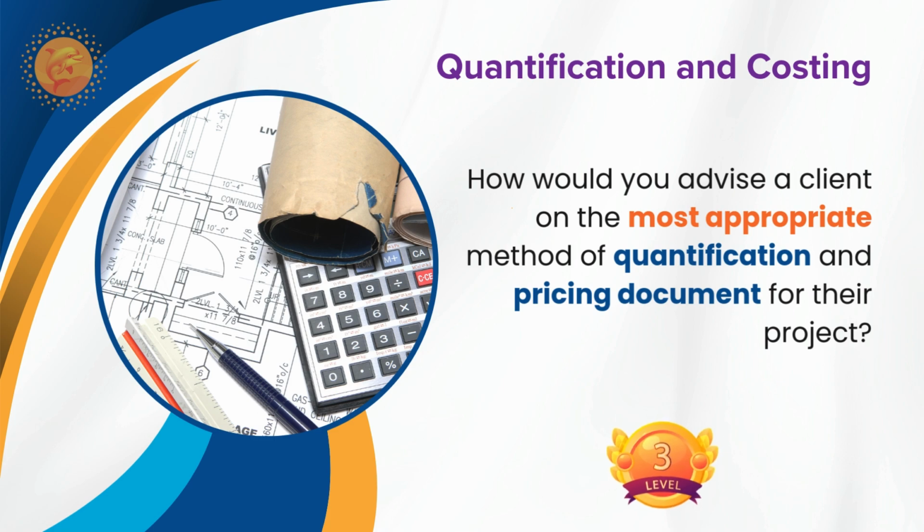I advise my client he can use, first thing, I will ask and understand the scope of the work of the client. Based on the scope of the work, I will advise him to use a suitable standard method of measurement. As an example, CESMM3 or CESMM4 for infrastructure work, and BMI for building works, and then NRM2.